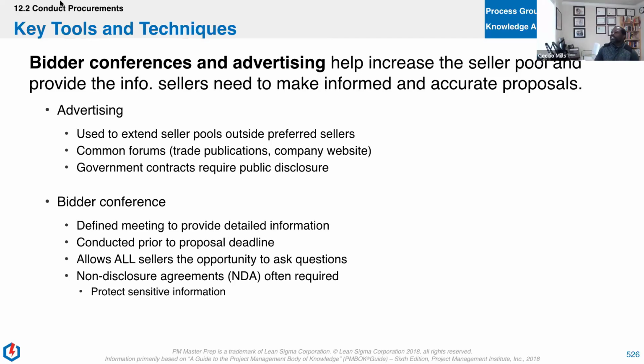So let me describe it. What'll happen is you'll send out an RFP or you'll respond to an RFP. I'm going to describe it from the point of view of the buyer. So I'm the buyer and I sent out an RFP, and then a week later I've responded to a couple questions and posted it on the site. I recognize that I'm getting a lot of questions, so I schedule a bidders conference, alert all the folks who have responded, and put it up on the site.